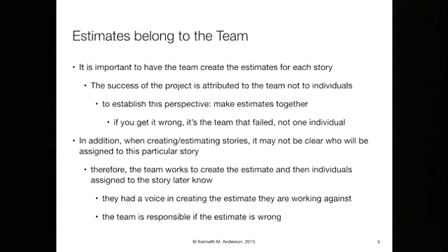Now, one important point just to remind, I mentioned this in the Intro to Agile lecture as well, but it's important to have the team create these estimates, not to have them given to them by management. The team needs to look at the requirements and really talk it through. What does this mean with respect to the user interface? What does it mean with respect to the back-end database? How are we going to get these two to talk together? Do we have enough experience to do this quickly, or is it going to take us a while? Do we have to spike on some of the technologies?